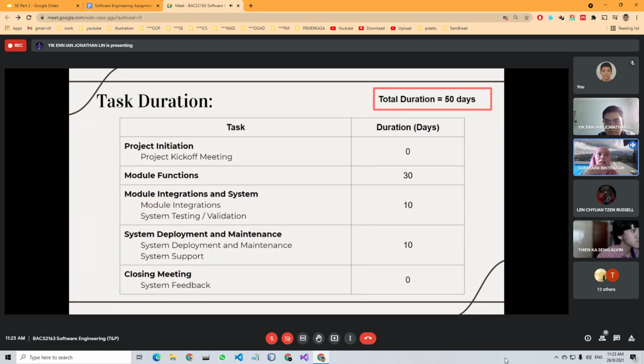Actually, in the real world, it depends on your company's decisions. But usually, what we did last time, whenever there is any problem or complaint for that system during the maintenance period, one staff will be allocated to receive the complaint or any changes to that system, and then that staff will coordinate.